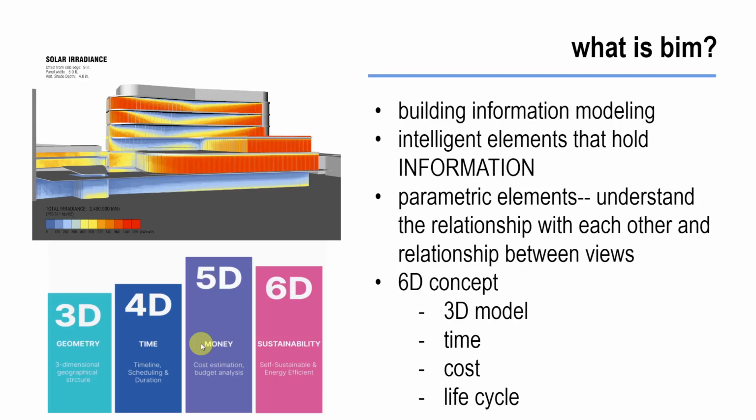And then we can figure out, okay, well, this is how much square footage of drywall I have, or I can even figure out how much glass I need, how many windows I need to buy, and then we can get a pretty accurate cost estimation of what our building's going to be. And then additionally, we can do some life cycle analysis from a sustainability perspective.